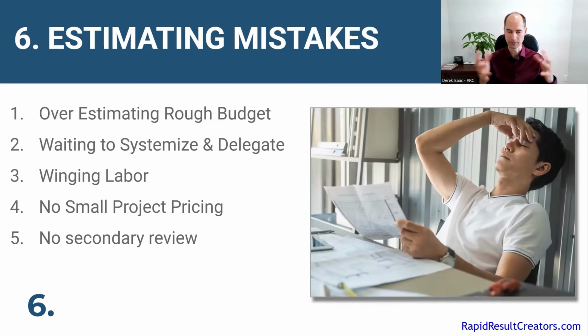No secondary review. So I mentioned that as far as double checking it, you should be double checking it yourself, but also make sure you have someone else in the company or that you trust to double check and review the estimate together. A quick 10-minute review is all you really need for someone else just to get a second set of eyes on it, make sure nothing's forgotten or your pricing isn't out of whack.